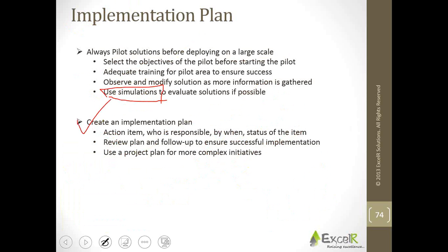All right. Next thing is to create an implementation plan. Suppose you have piloted the solution and you have felt that the solution was excellent. It worked wonders. Then you try to implement it in full scale. That is when you come up with the implementation plan. What action should each person take? When should they take it? And what is the status of the item? Is it open, closed, or ongoing? You're going to review the plan and follow up to ensure successful implementation is performed. Use a project plan instead of an implementation plan for complex initiatives.